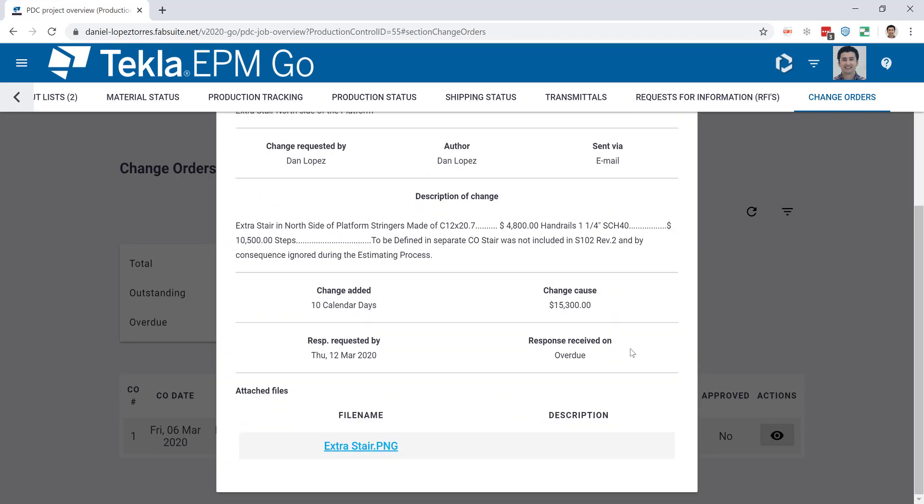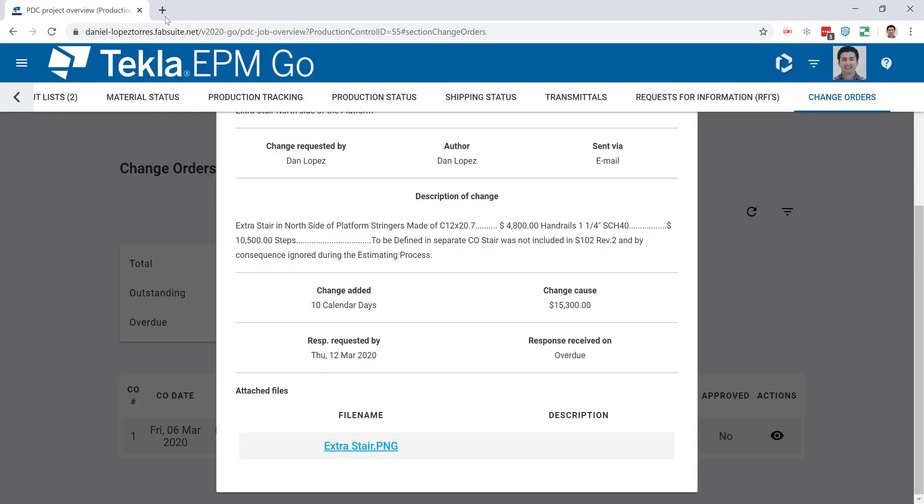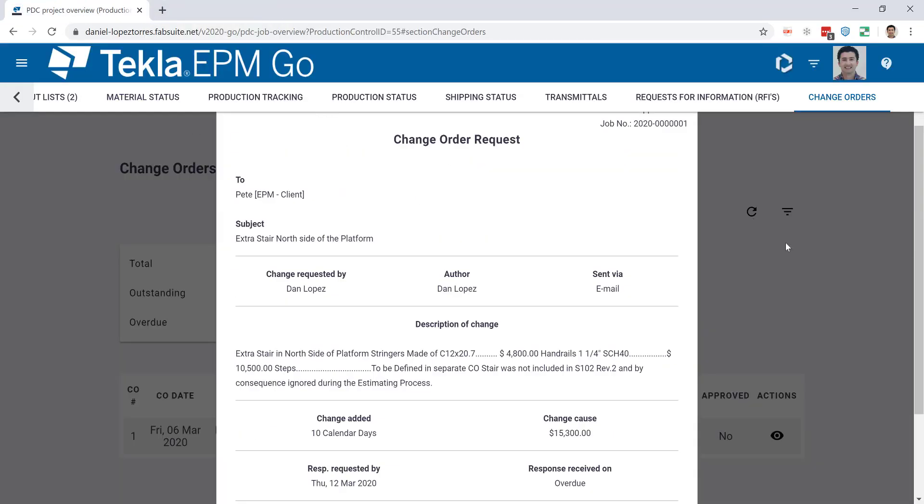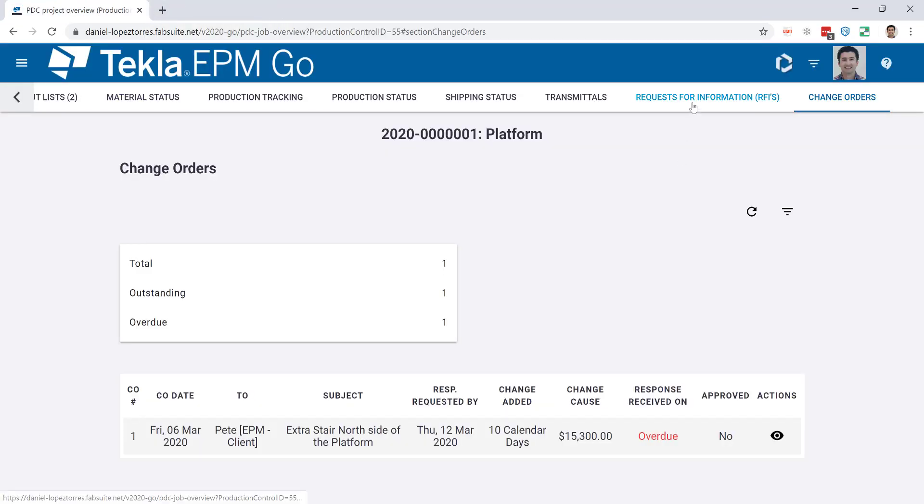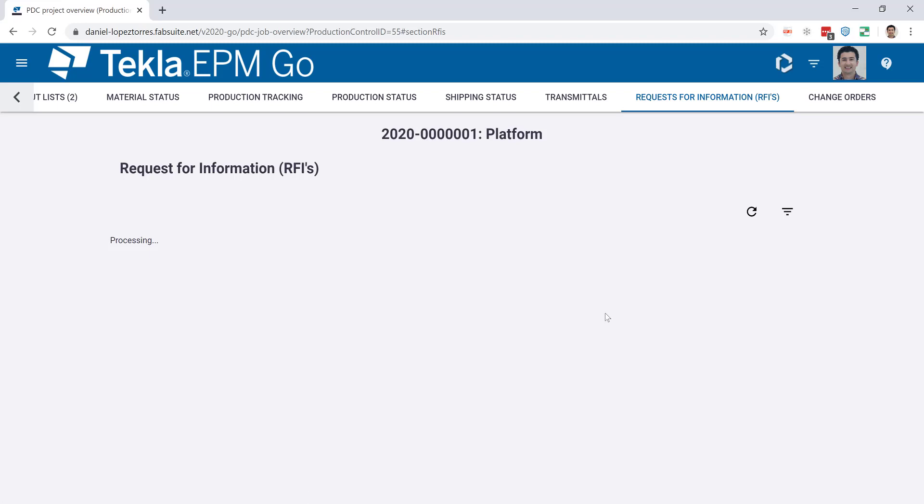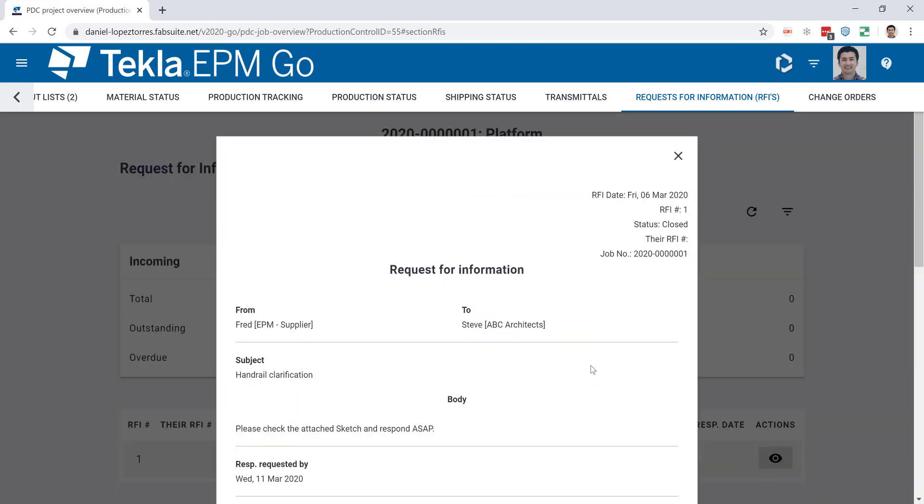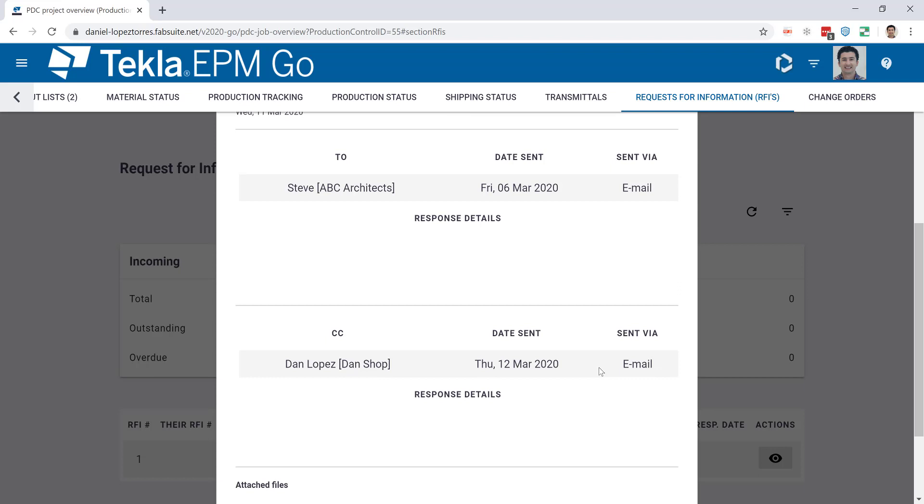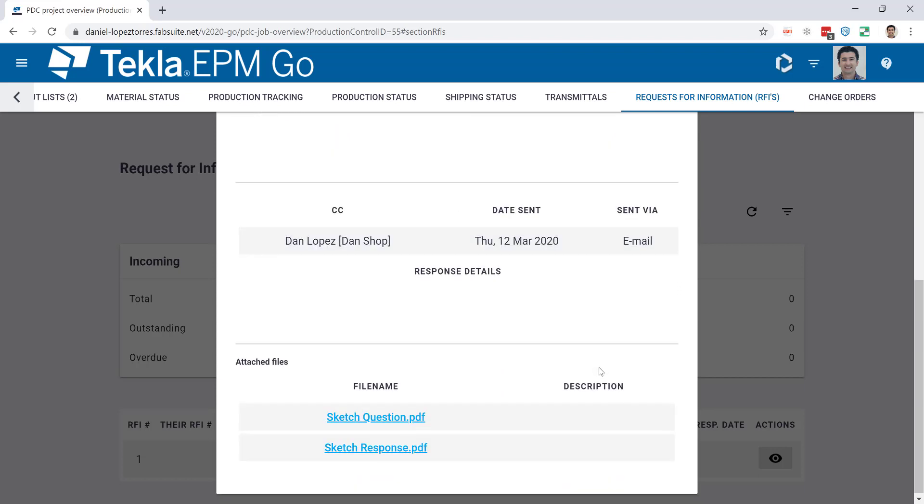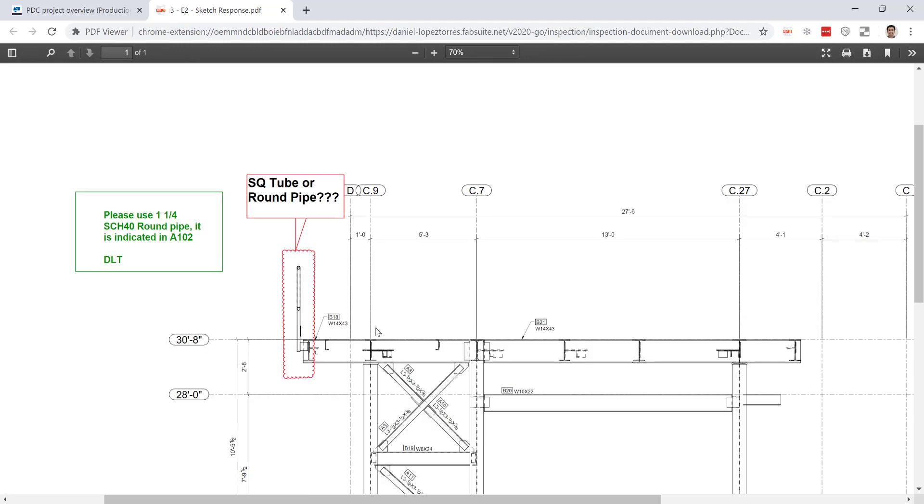The change orders will show you the format that you submitted. You can see here this one is overdue, and if I go to the details I will see everything that I'm trying to get paid for, which in this case is an extra stair. I can actually see the file that's attached to that change order and it will be available from anywhere you are. And lastly here, the request for information, where you can actually see the status and the information inside of the RFI and even open the attachments that you may have received, either the answer or the question. Both will be available in EPM Go.